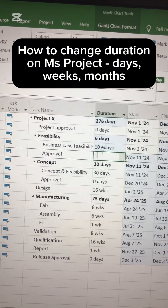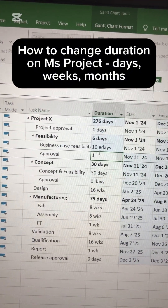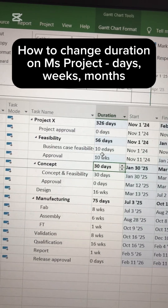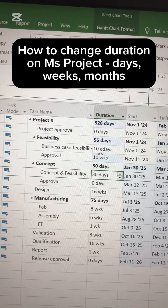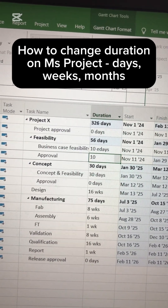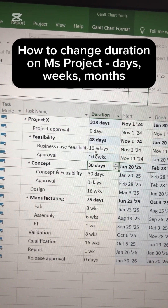You can use the same trick if you want to do it for weeks — so you put 10 and 'w' for 10 weeks, but you can also make it 10 elapsed weeks by using '10ew'.